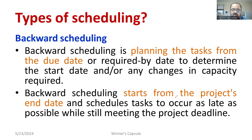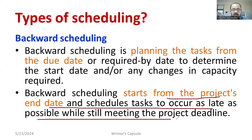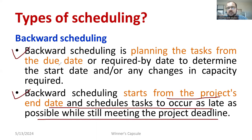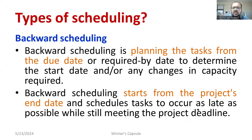Backward scheduling starts from the project end date and schedules tasks to occur as late as possible while still meeting the project deadline. You can use whichever definition is convenient — from the last day to the beginning, you schedule. That last date is when the project needs to be delivered to the clients.